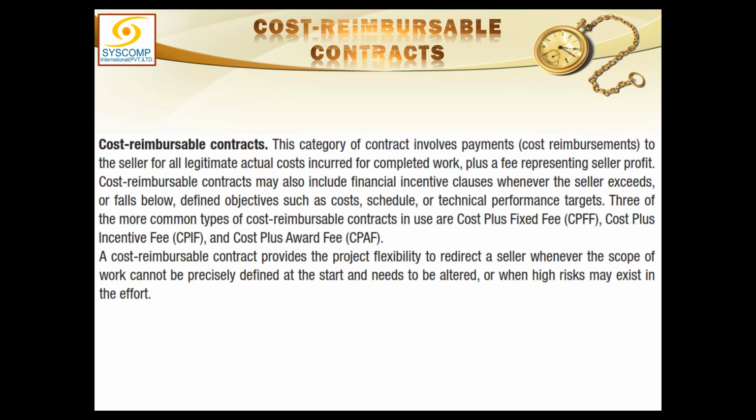So we hire a contractor and we tell him to do this job, and whatever is the cost of the materials and everything, labor and material and everything, that cost will be promptly reimbursed during the life of the project to the contractor. So he cannot keep any margin for profit or anything, because the cost he is actually not paying. Actually we are paying, we are reimbursing him that cost.